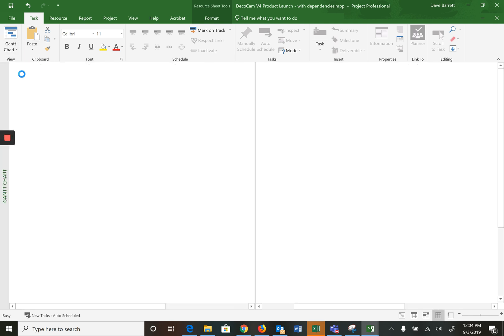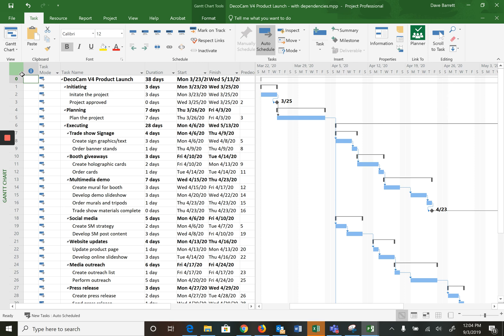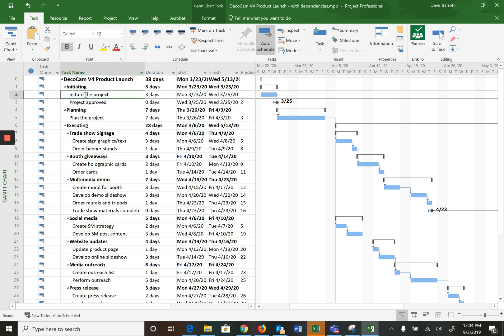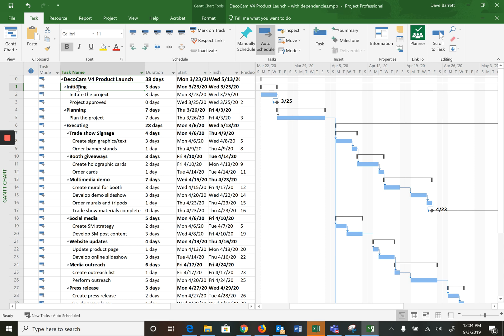So let's go to our Gantt chart, and now our challenge is we need to allocate the resources to the appropriate activities. Now word of advice, please only assign resources to the lowest level activities, the actual work items. Don't, even though the software will allow you, don't assign resources to summary tasks. It will technically work because then their time is prorated to each of the ones below, but it gets really complex. So please don't.